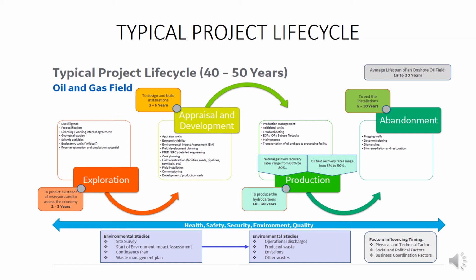Lastly, the abandonment phase consists of plugging wells, decommissioning, dismantling, site remediation, and restoration. In general, it takes 5 to 10 years to end the installations.